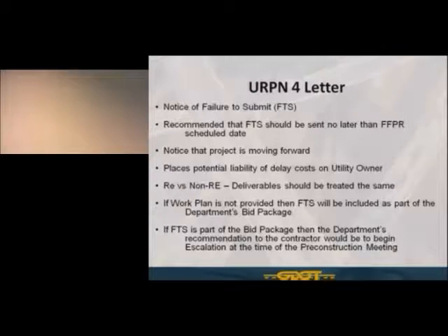And essentially what that FTS letter is doing, and this is in accordance with what was put in place with Senate Bill 19, and is covered in state law now, it is putting you, the utility owner, on notice that the project's moving forward. We're not going to hold up the project due to the deliverable that was requested of you not being returned.